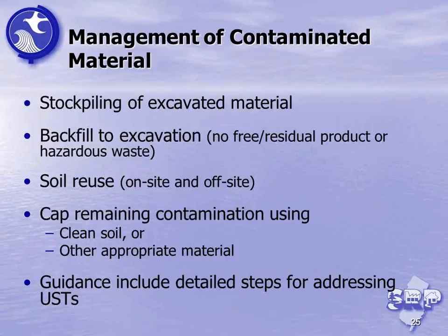Now we come to what the guidance document is really all about, and how you manage this contaminated soil that comes out of the excavations or that you may encounter during the roadway improvement project or the railway construction project. And there's several options and several scenarios covered in the guidance document. Obviously, a lot of these are going to involve excavation of the contaminated soil. So you need to get a soil management plan or materials management plan together. It may include, and I'm sure a lot of them do this, the stockpiling of the soil on the site, particularly if you're looking at reusing or disposal.